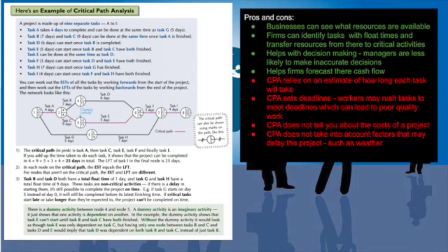And then again, going to task B and to task C, you add on the duration. So if you look at node 4, you see it adds 4 plus 7 to get 11. And then for task C, and that's node 5 now, 4 plus 9 is 13. And now when you go from task D and task E, both end up at node 6. And if you've noticed already, you'll realize that you can't really add both of them. You're only going to get one value. So what you do for the EST, you always take the largest value. As you can see, 11 plus 6 is 17, but 5 plus 13 is 18, and it took the largest value. The earliest start time is always the largest value,